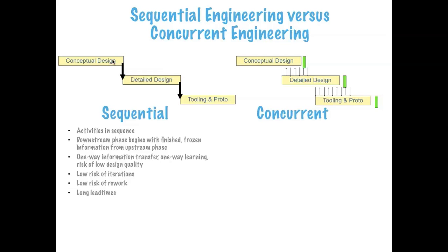There are long lead times because, if you want to wait until the last bit is completed, often those last 10-20% take the longest time. There is some kind of 80-20 rule: the last 20% take 80% of the time. There is even the rule that the last 20% take 100% of the time. But that's a joke. Long lead times.